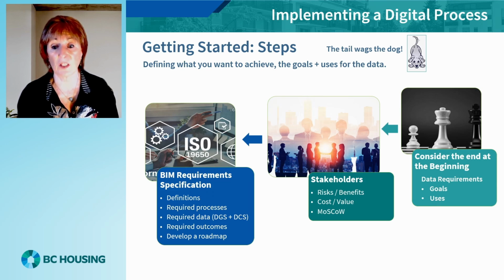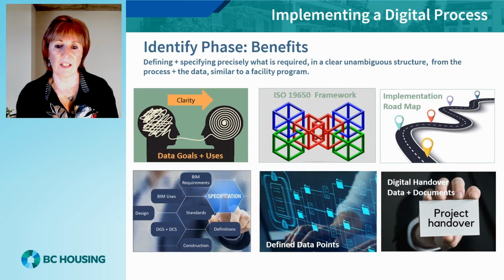The starting point is typically defining what uses are required for the life cycle phase, and therefore what data fields are required. Moving backwards to the start, establishing when during the process those data fields are required to be present within the dataset to drive other processes. The identify phase identifies not only why you are undertaking a BIM process, but also, by working with stakeholder groups, defines what the goals and uses for the data will be, along with a roadmap that will set out the implementation strategy for the organization.